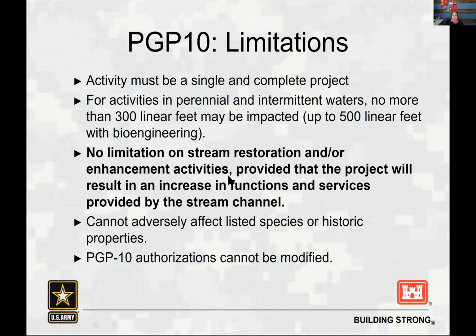And then again, the project cannot adversely impact listed species or cultural resources. And when we're talking about listed species, we're talking about federally listed species, not state listed species. So that's an important distinction to make when it comes to threatened and endangered species.